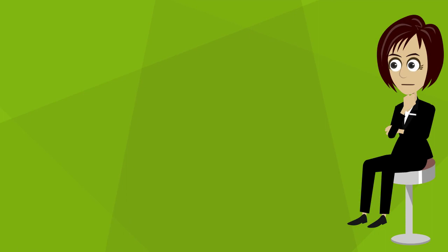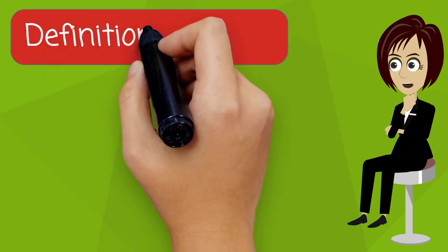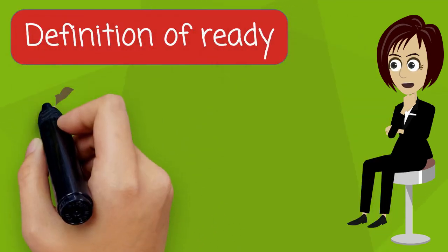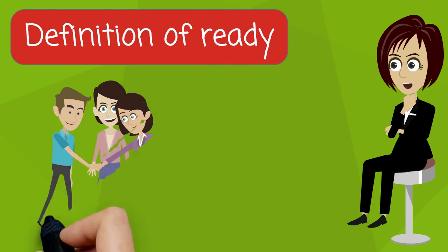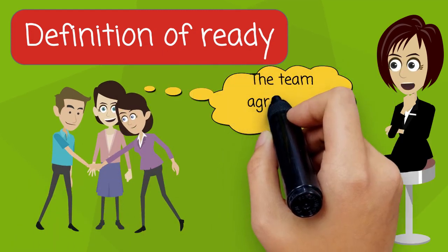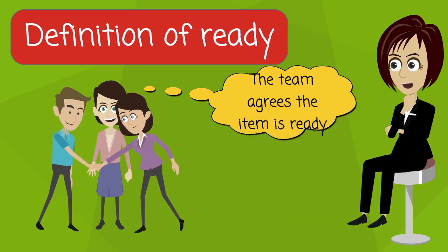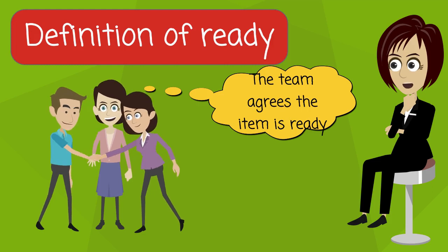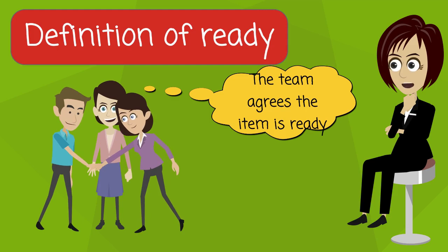What is the definition of ready? This is a set of criteria the team agrees must be satisfied to consider an item ready for the next iteration. Initially, teams can set the criteria as a critical mass of team members that agree that an item is ready for the team. As the team reflects and looks to continuously improve, the team may identify additional criteria for their initiative.